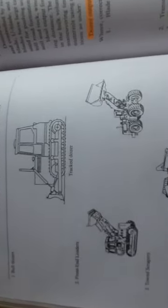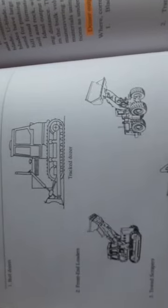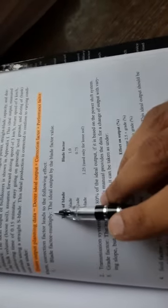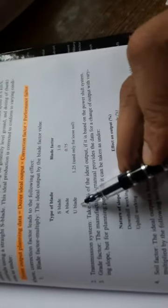This is how the bulldozers look like, and these are the different parameters you have to look out when they're given in the problems. So first is the blade factor multiplying. You have S blade, A blade, U blade. This is the blade factor you want to multiply depending upon the kind of soil.